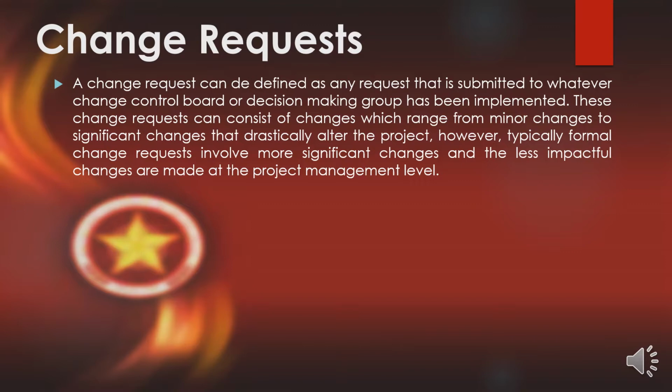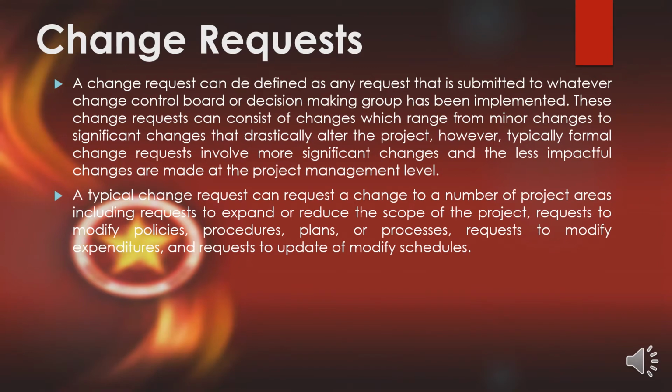A typical change request can request a change to a number of project areas, including requests to extend or reduce the scope of the project, requests to modify policies, procedures, plans, or processes, requests to modify expenditures, and requests to update or modify schedules.